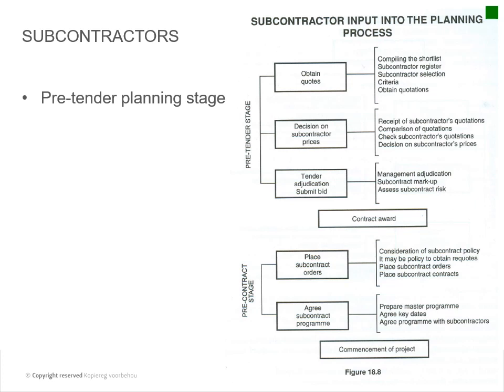Now we get to subcontractors, which is very important. You've got subcontractors, pre-subcontractor planning, and then during-construction planning. You need to compile a shortlist, a subcontractors register, subcontractor selection criteria, and obtain quotations. If it's a large company, those subcontractors usually have to be on their vendor lists. If it's something specialized, there's a whole lot of red tape to get quotes from other contractors and get them onto their registers.